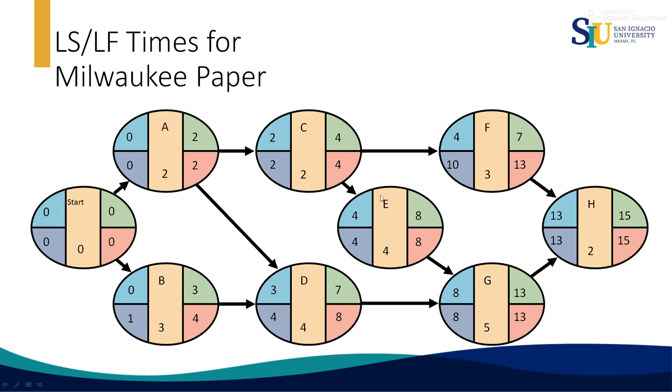And then we complete the rest of the network. Now, the activities in the critical path have, for instance, here you have the early finish is 2 and the latest finish is 2. 2 minus 2 is 0. It is saying that the earliest start and the early start, 0 minus 0 is 0. Then you do subtraction vertically. For instance, here the slack is 0, here is 0.